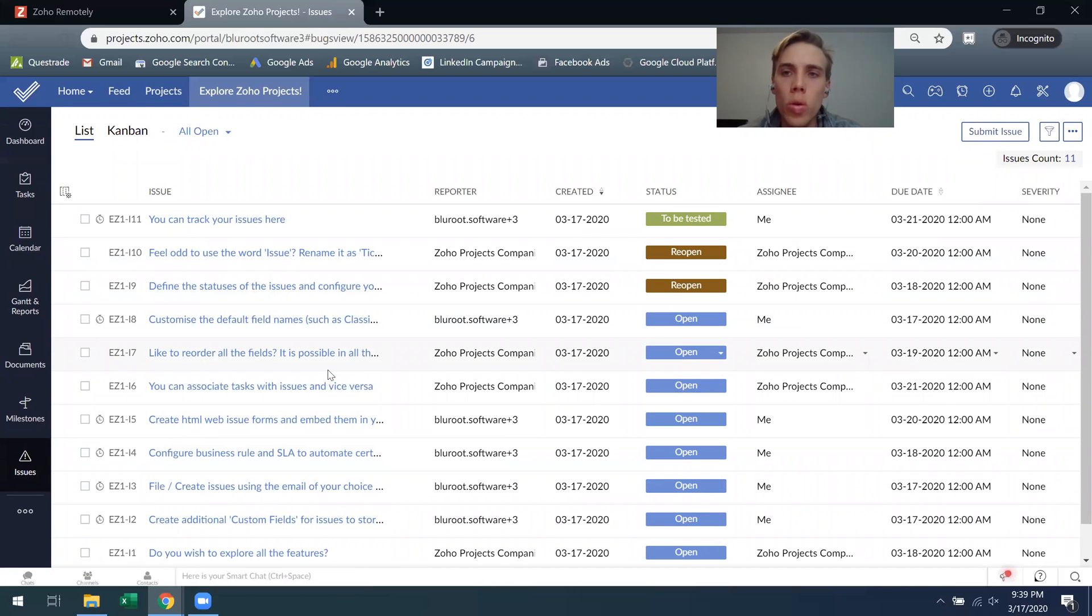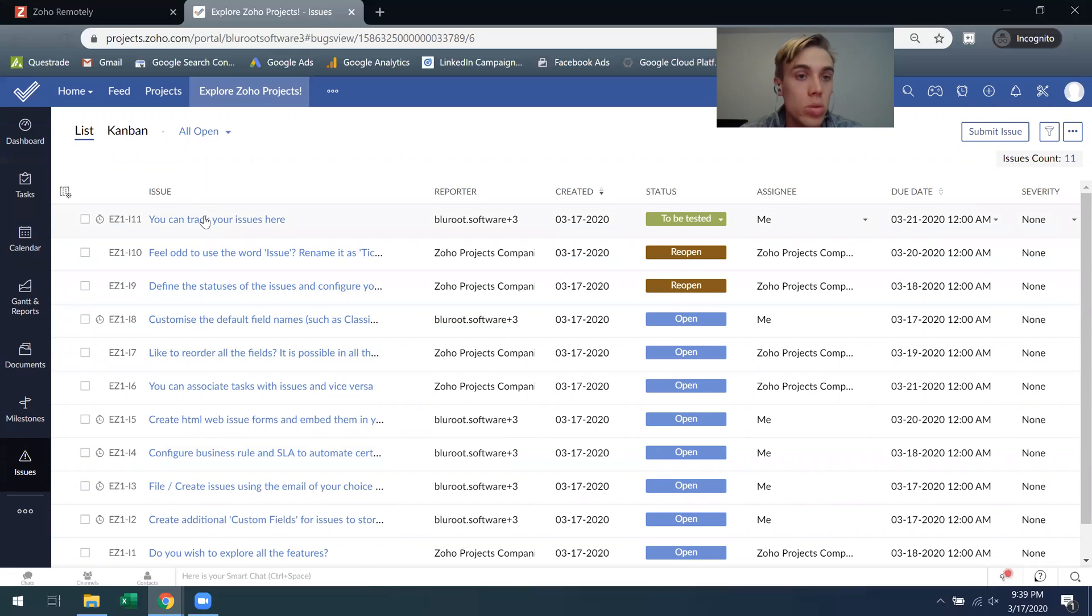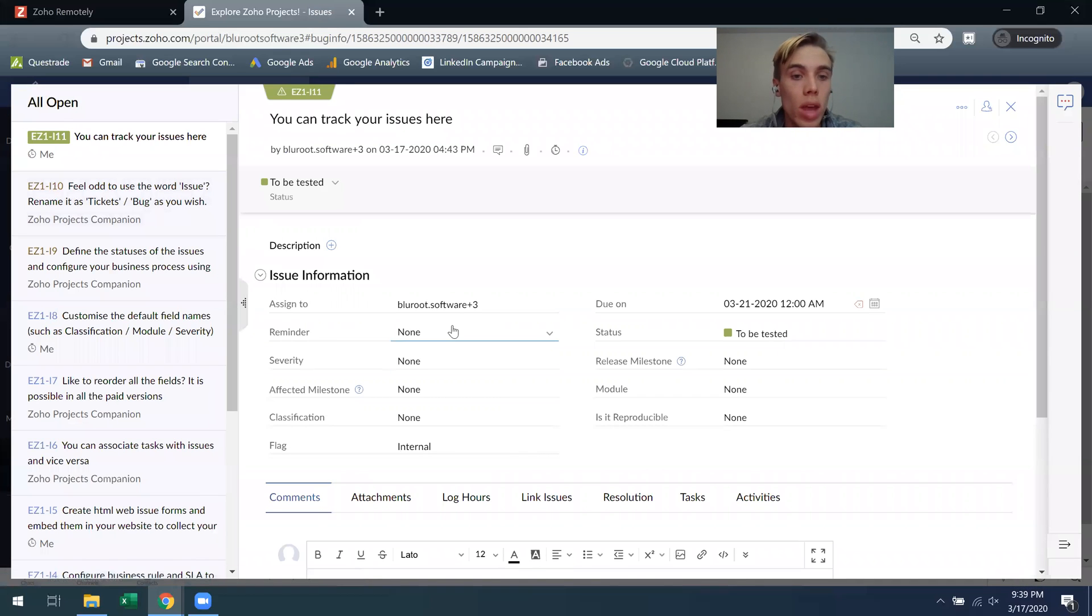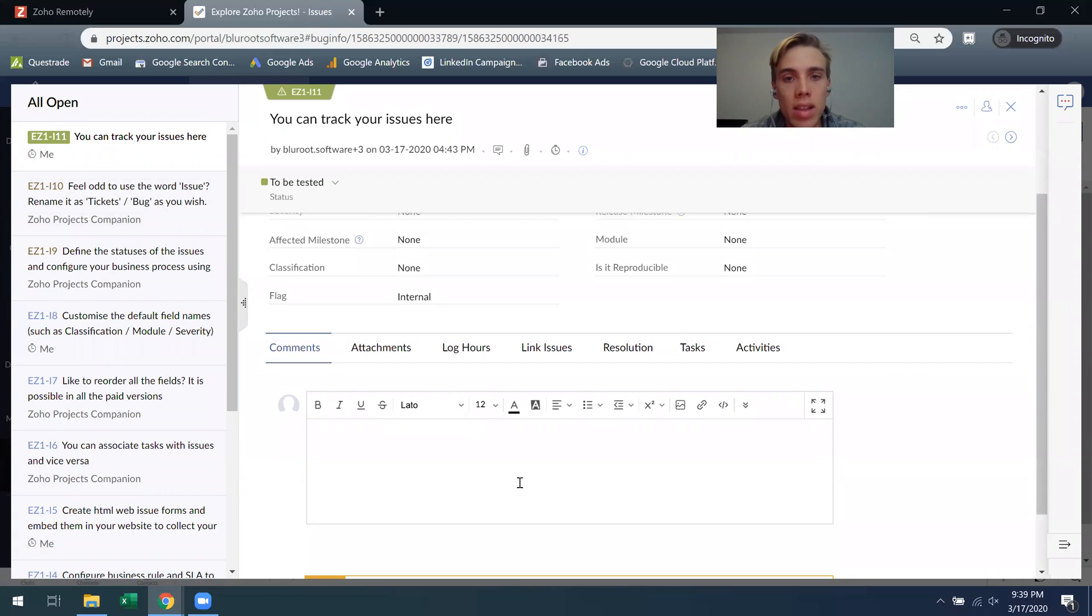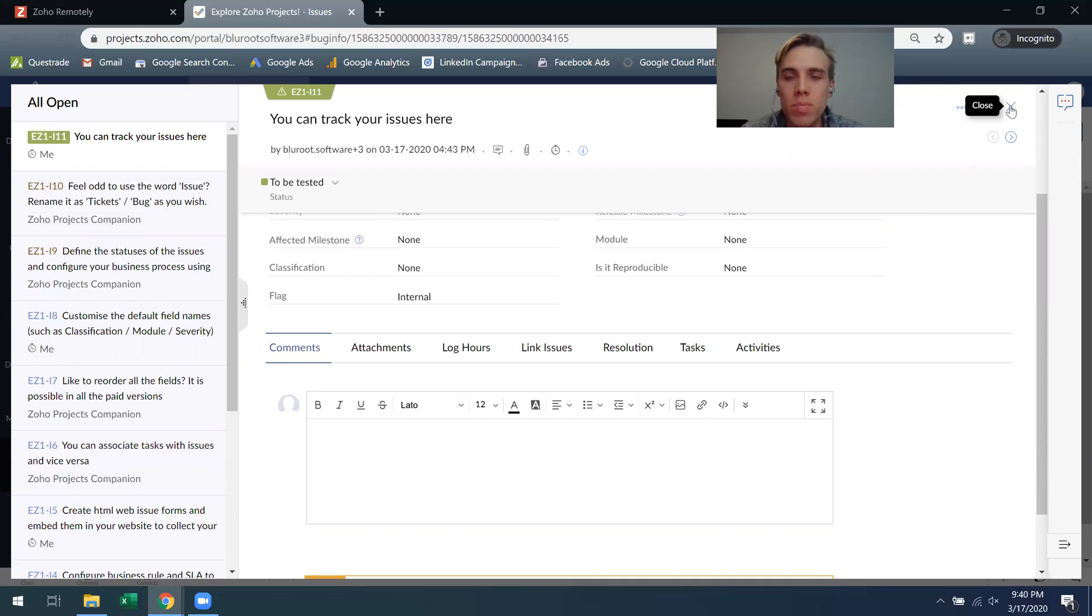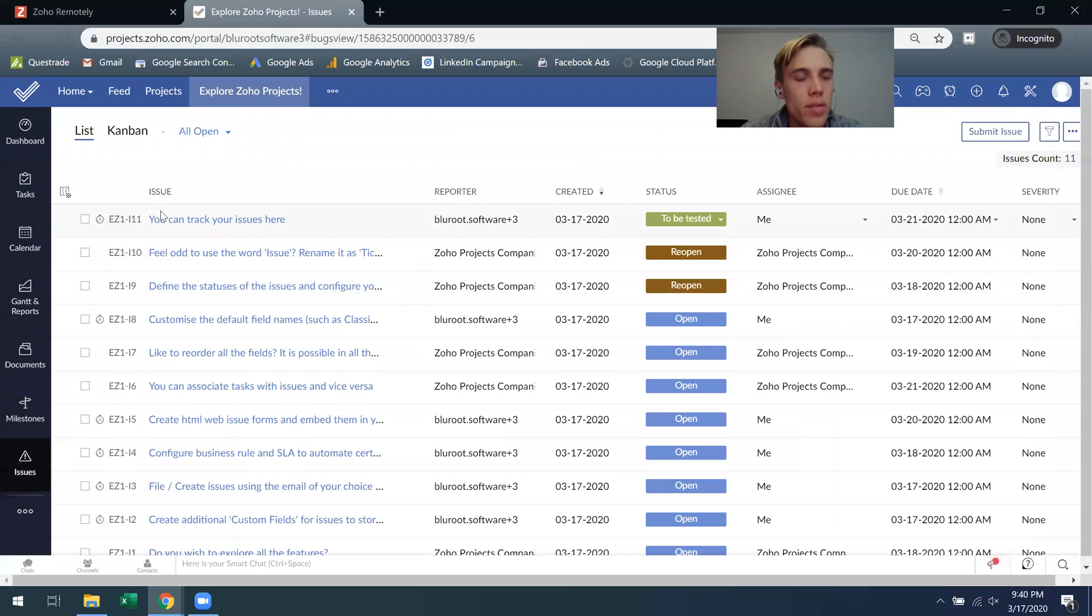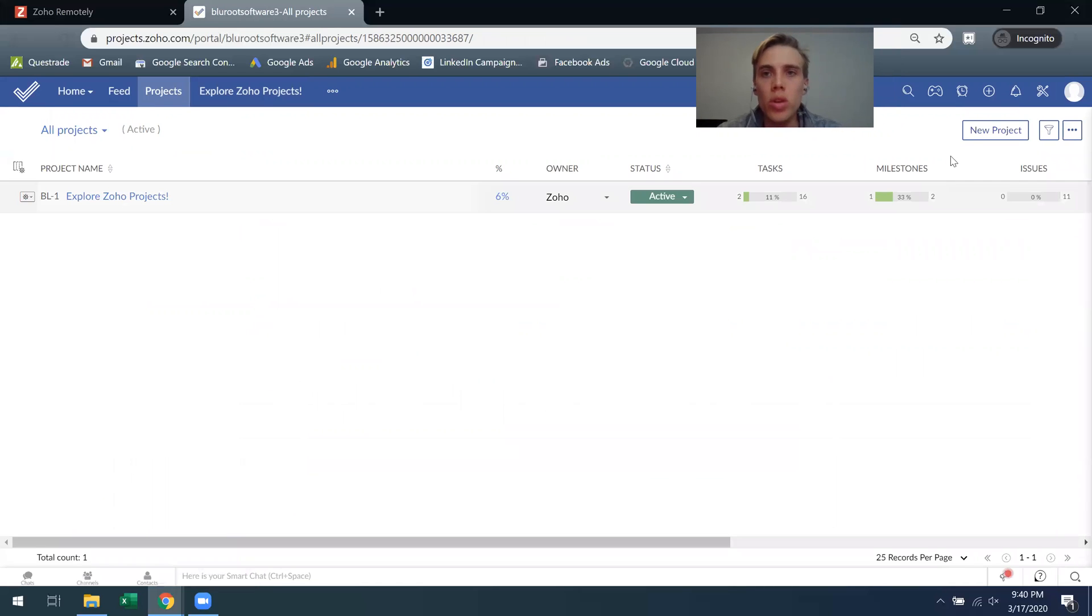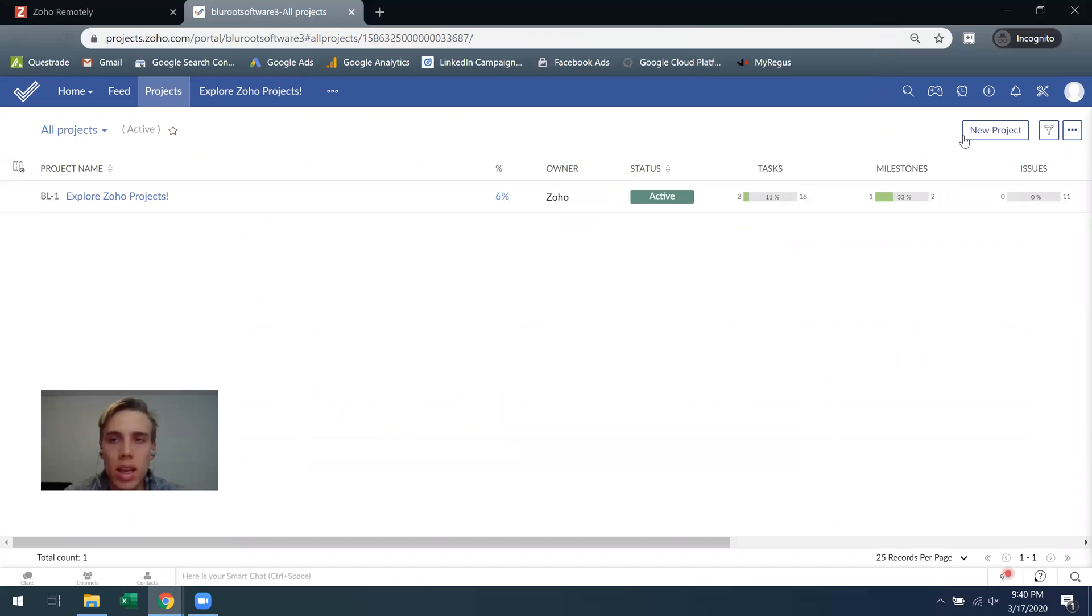And then the only thing I've touched on this a couple times is issues. So if something goes wrong you can create an issue, attach it to a task, and it actually works just the same way. You'll have the user who's involved, the status, and then you can start logging hours, comments and attachments related to the issue. So similar to a task but basically an unplanned task is what an issue is.